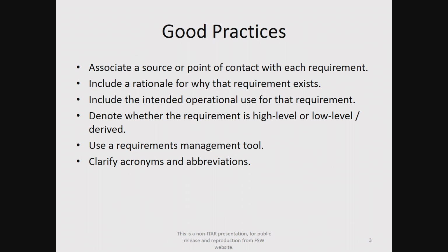Some of the good practices I've stumbled upon are that I should associate a point of contact, or some person who owns each requirement. There should be a rationale for why each requirement exists. There should be an intended operational use case for each requirement. Requirements should be noted as to whether they are high level or low level, or low level could also be derived. The requirements management tool can help a great deal. And even if we believe we know acronyms and abbreviations, we should spell them out too.